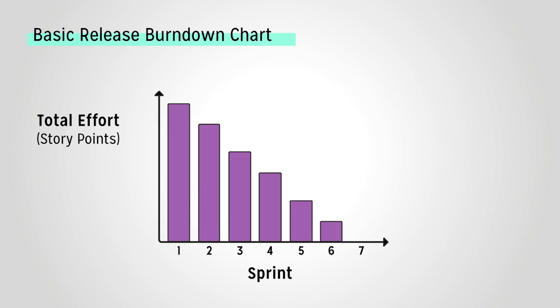Each bar in the graph that corresponds with a sprint represents the total number of story points that are still remaining at the beginning of the sprint. Naturally, at the beginning of Sprint 1, we have all the story points remaining because we have not started completing them yet. This represents your total effort — the combined total of story points for all user stories you intend to complete in the project. As you complete requirements, you remove their story points from the burndown chart.